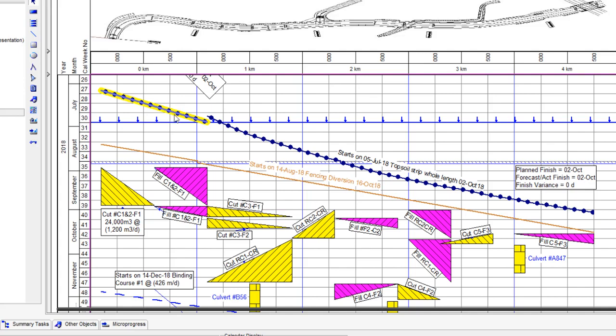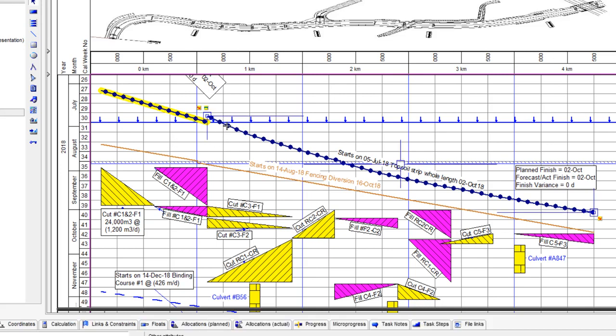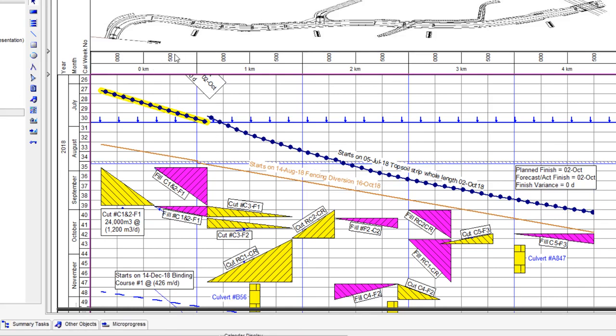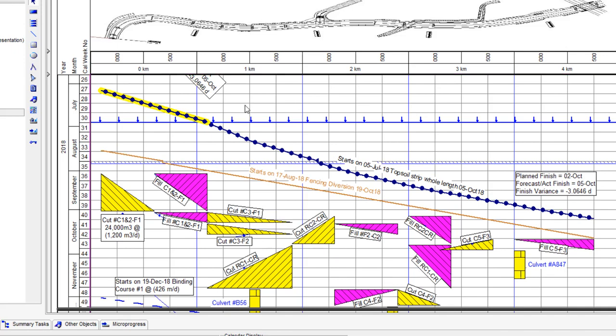So we can mark it up with this yellow background marker. So behind any line, we can have a deep, thick, like a marker pen to show where it's been progressed, or we can choose a line style and cross it out. But it means we've done this amount of work. This amount of work should have happened. It's before time now. And if we were to reschedule the program, we can see the impact that's got, and it's been pushed on ahead of time now.